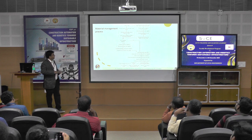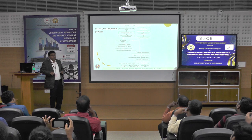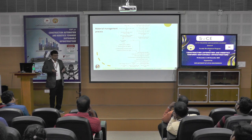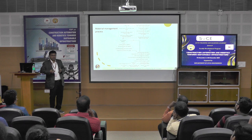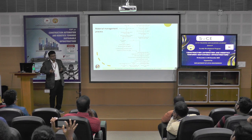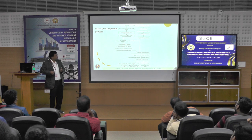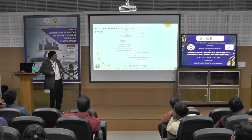The MR register is the handbook where the construction manager writes requirements. That is then converted to EMR. Once EMR is generated, it becomes system-generated and is known to the procurement team, planning team, and project manager. The EMR is then authorized by the competent authority — maybe the project manager or planning manager. There are two systems followed in industry: central procurement and project procurement.